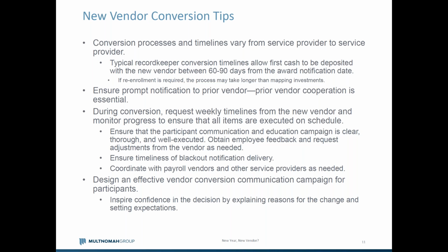Another tip as it relates to the conversion is ensuring a prompt notification to the prior vendor. It's really important that the prior vendor cooperate. A lot of times we see plan sponsors that are reluctant to notify the incumbent until the last possible minute because they're concerned about the quality of the service they're going to get. The incumbents have deconversion processes and their own timelines that they're going to work with. If you wait too long, that can mess up your timeline, and there's not a lot of leverage you have to alter that. So I think it's important to let them know up front and be clear so that they can provide support through that process. They're certainly not wanting to lose the business, but they tend to be pretty professional and respectful of that process, but it's important to notify them at the outset.